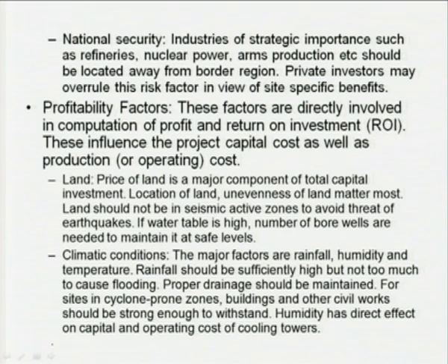The first one is the rainfall. Average rainfall or intensity of rainfall has a direct bearing on the storm water drainage system. Okay. If there is a water surge or flood, if the plant's site is located in a flood area, then the entire plant may come to a standstill if there is enormous rain, okay, because of water entering the plant site. Okay. So, we have to make sure that we know the rainfall that is available.